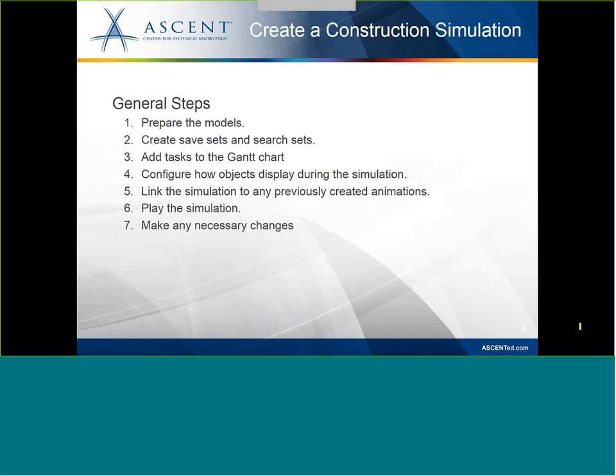go back to your team and say, hey, you know what, we're not getting the road done fast enough to be able to put in this or that on the building, and we really need that done before we can put it on the building, because otherwise, maybe it's a really sandy soil or something like that, and maybe the crane is going to fall through the existing ground surface, so you need to make sure that that road is done and in place before you can actually do that. And so you go and make those changes. You communicate with the team. It's all about communication. That's what Navisworks is here for, to facilitate that communication on the project.